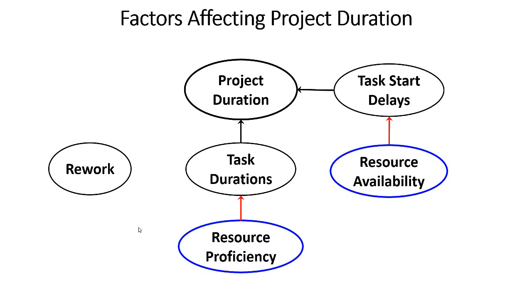And there's another factor that comes into play though we need to consider, and that's rework. Tasks are not necessarily done just one time. Often we've got to revisit the tasks because they weren't done correctly. There was a mistake or something malfunctioned, and things have to be done over. So we know that if we increase the amount of rework on a task, that the total duration of that task is going to increase.